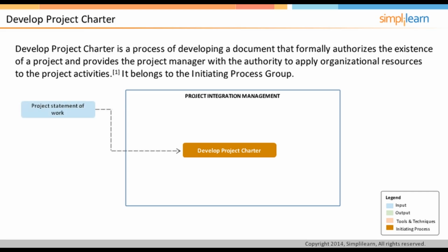This is created by the project sponsor, or the customer, describing their needs, project scope, and how the project fits into their strategic goal. If the project is taken up under a contract, the request for proposal, that is, RFP, can be considered as the Project Statement of Work. The next input is the business case.